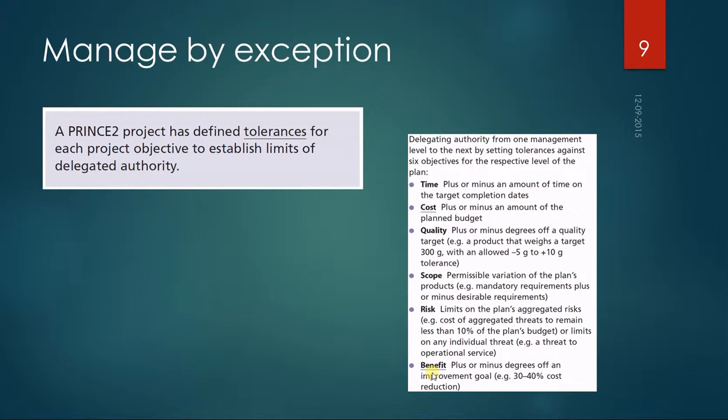And then when you say January, if you deliver it the 1st of January, it's fine, but you can also deliver it in the middle of January, because you have just promised the steering group that you will deliver it in January. And if there come up different small issues that force the project manager to change the schedule a bit, so the end just moves around in January, then the project manager doesn't need to ask the project board for approval of changing the plans. And it's the same for cost.